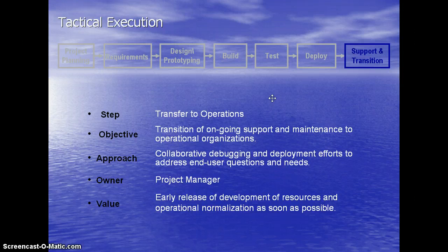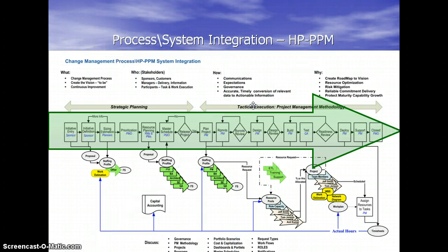Support. This step could include many details: the creation of the knowledge assets for the improvement of the process and the long-term evaluation of project objectives. Those values utilized to prioritize and select the initiative should be tracked and compared to improve the benefit estimation process as well. Lessons learned should include not only the project delivery experience, but include the process execution experiences as well.